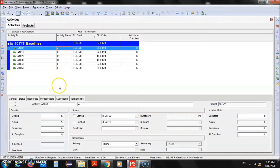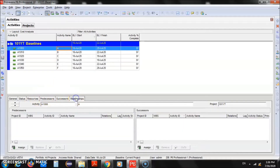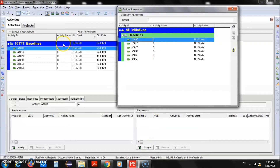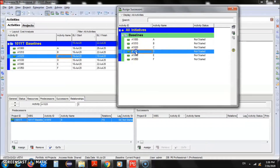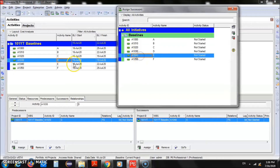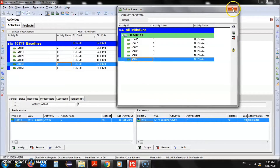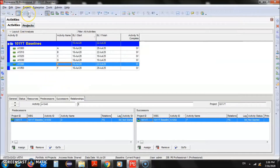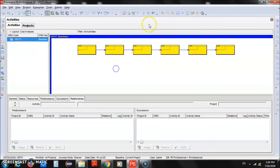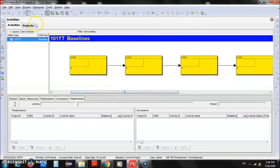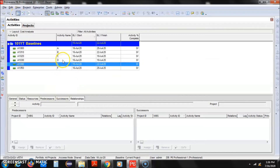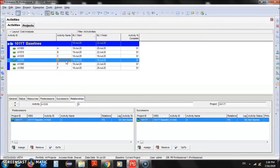We'll select Activity A, go to the Relationships tab, then go to Successors and click the Assign button. For A the successor is B, for B it is C, for C it is D, D is E, and for E it is F. We'll close the window. You can also view these relationships in the Activity Network Diagram — you can see Activity A, B, C, D all in order.